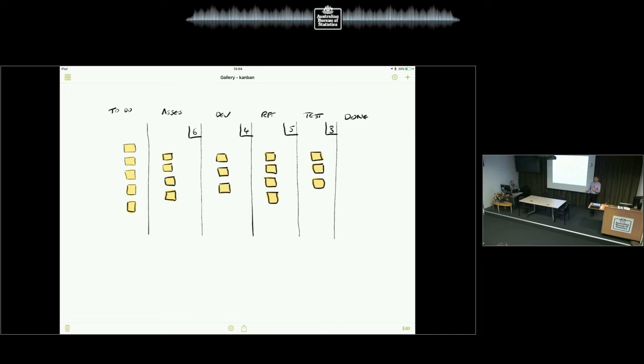And we'll move on in a minute to how you visualize that, because if the business knows that having something on your in-tray for a week is meaning that the team sat idle for a week and you're paying 25 grand a week for the team, then that's very expensive to have that bit of paper on your desk. But you need to know about it. Having said that, in lean principles, there's a notion of deferring decisions as late as possible. So we want to try and make decisions as late as we can. But then when we need to make the decisions, we make them. We don't make decisions beyond when we could have.